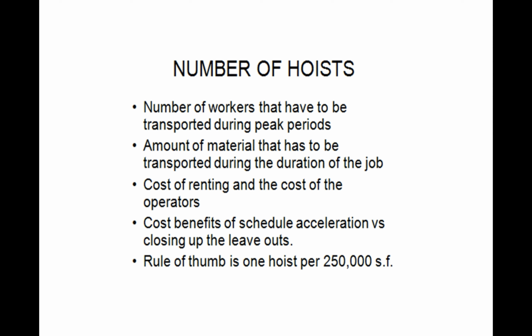If you have only enough lifts or hoists to take a couple of people up, and you're forcing 20, 30 people to wait for that lift to go up 10 floors, come back down, up 10 floors, you're automatically cutting your productivity, because you're only utilizing 20% of your workforce for that first hour. So you want to make sure that you have enough capacity to get everything you need up to your job.